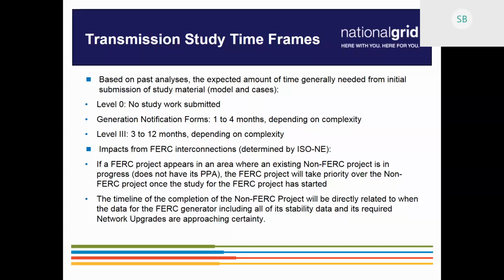That's why, for many years, we've required a pre-application report so folks know what they're getting into, right? We got a lot of applications in the 2,500 megawatts that didn't bother doing a pre-application report, right? So they went in blind to get in line for SMART. And we know how it works, right? But the fundamental reason is that's why we had that. That's why it's been in place since the 2013 revision of the tariff.